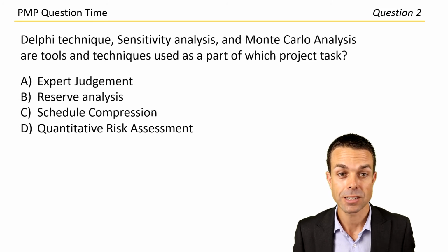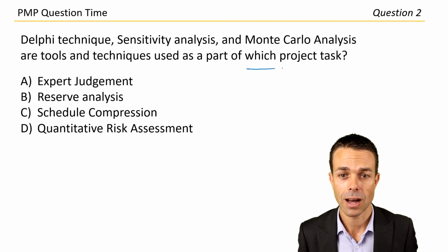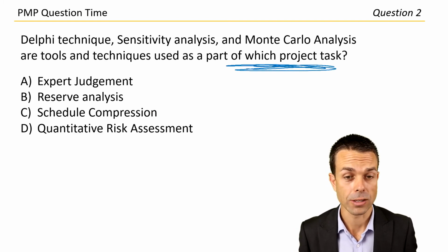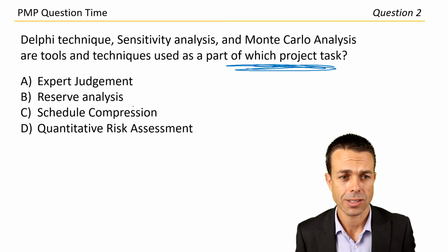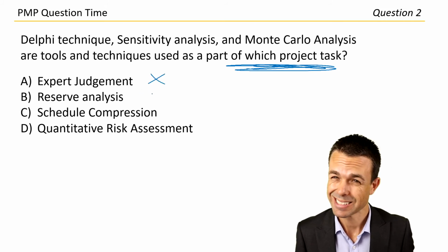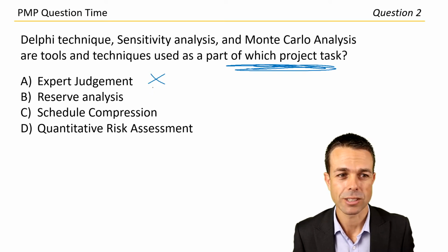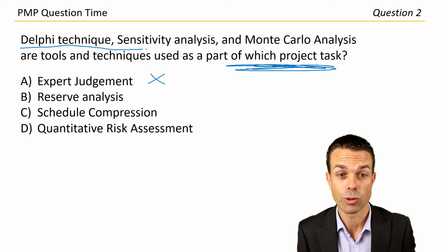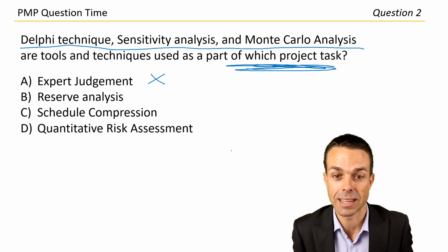Delphi technique, sensitivity analysis, and Monte Carlo analysis are tools and techniques used as part of which project task? Wow, okay, so project tools and techniques. Expert judgment, no, not related to those. Reserve analysis, reserves, cost. I don't think this is more of risk. So these ones are really around risk and really, to be honest, around quantitative risk analysis, the financial risk analysis.